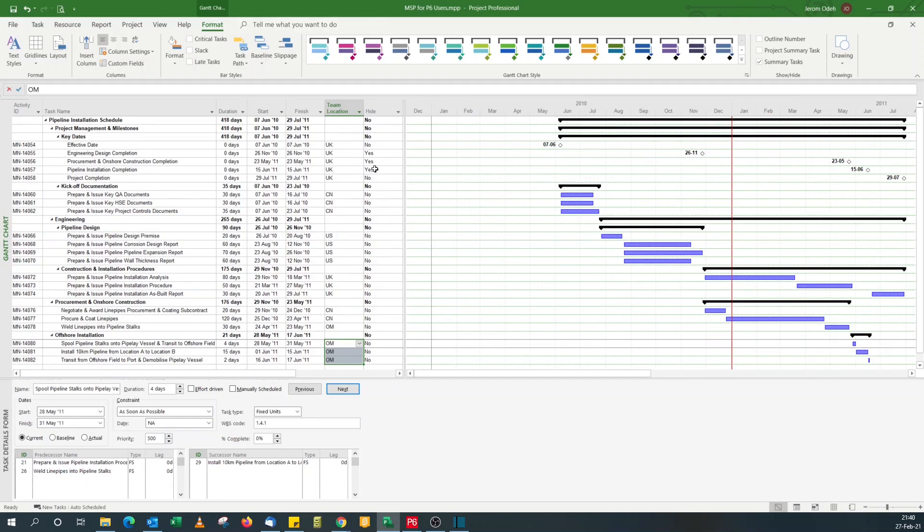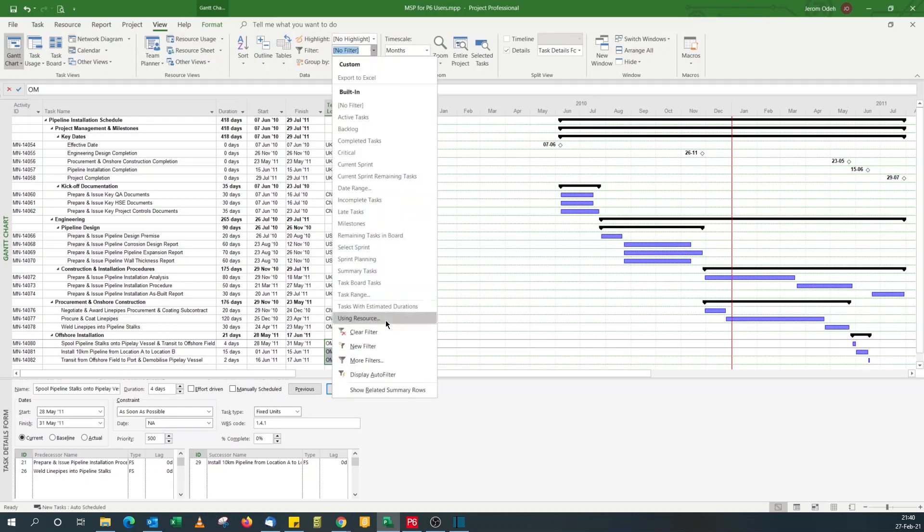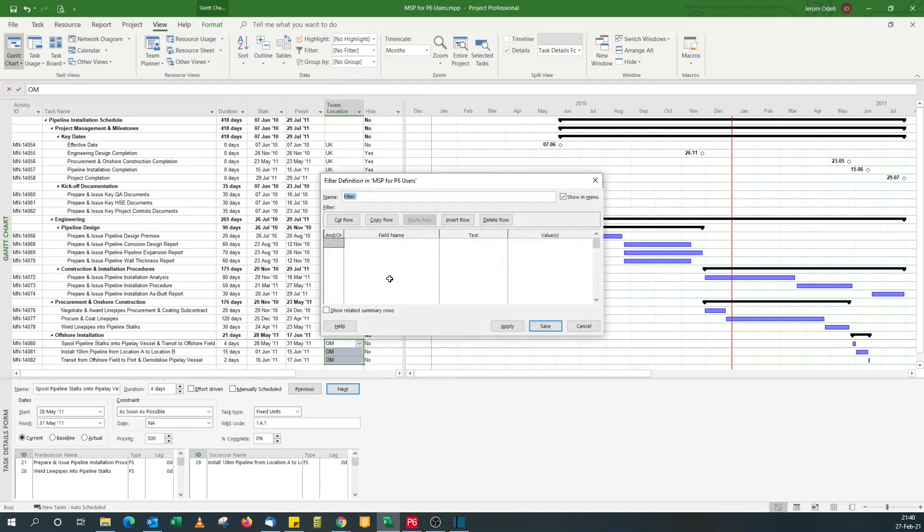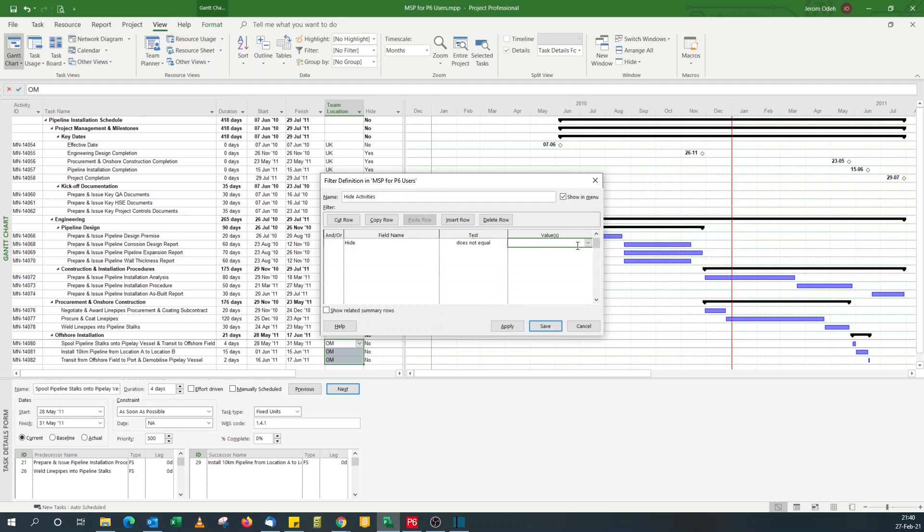So first I'll show you how to use a filter to hide this. For filter, you go to view filter, new filter. The new filter hide activities, and then it will be hide does not equal to yes, that's what I want to do.